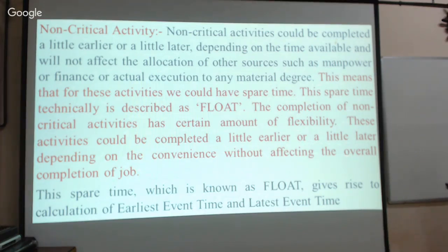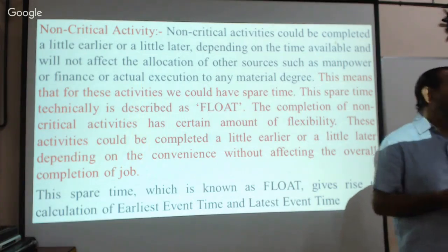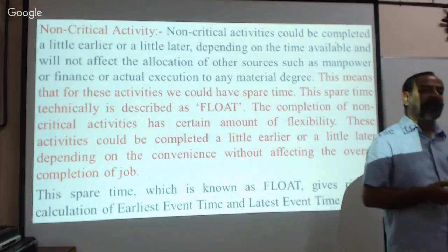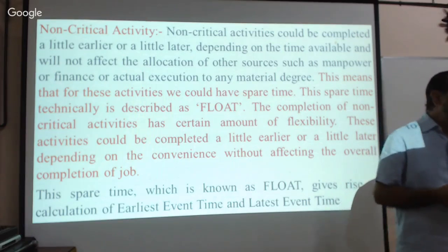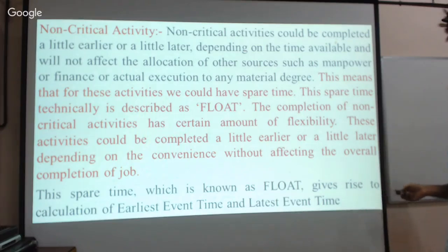The meaning of this is that non-critical activities can be started 2 days late, or 2 days early if needed, but critical activities must be started at the right time and completed on time. Okay, that is the meaning of this, isn't it?